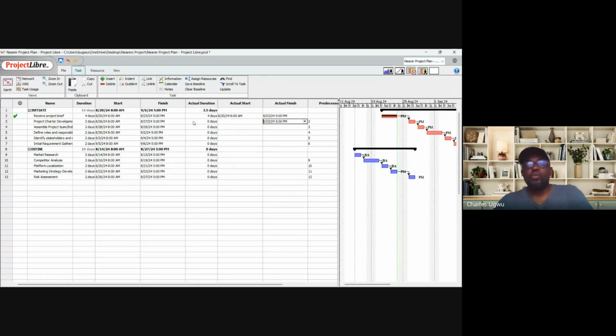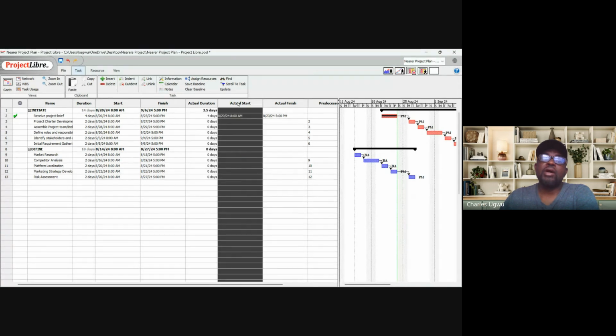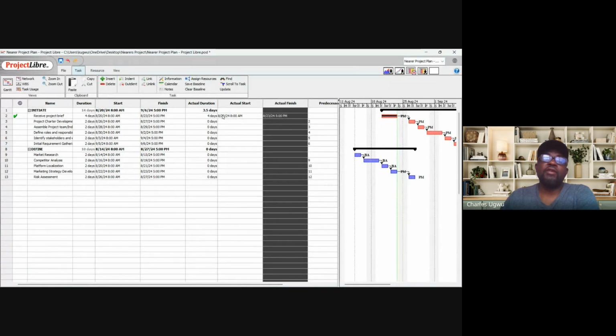So it's a quick update. At least we've seen how to add the actual duration, actual start, and actual finish. It's very, very important. But before you start updating, make sure you baseline.